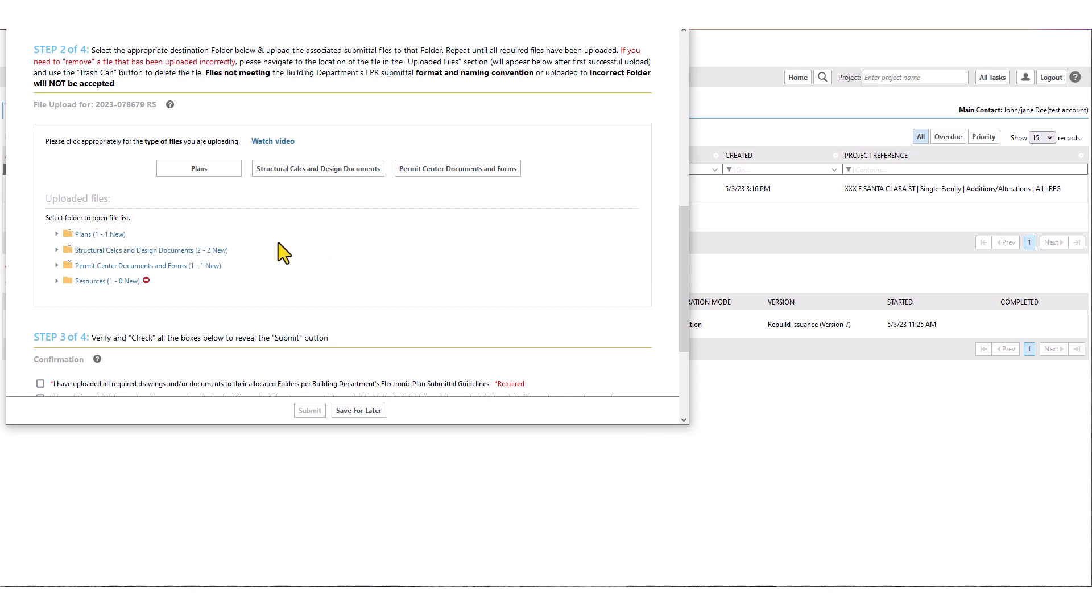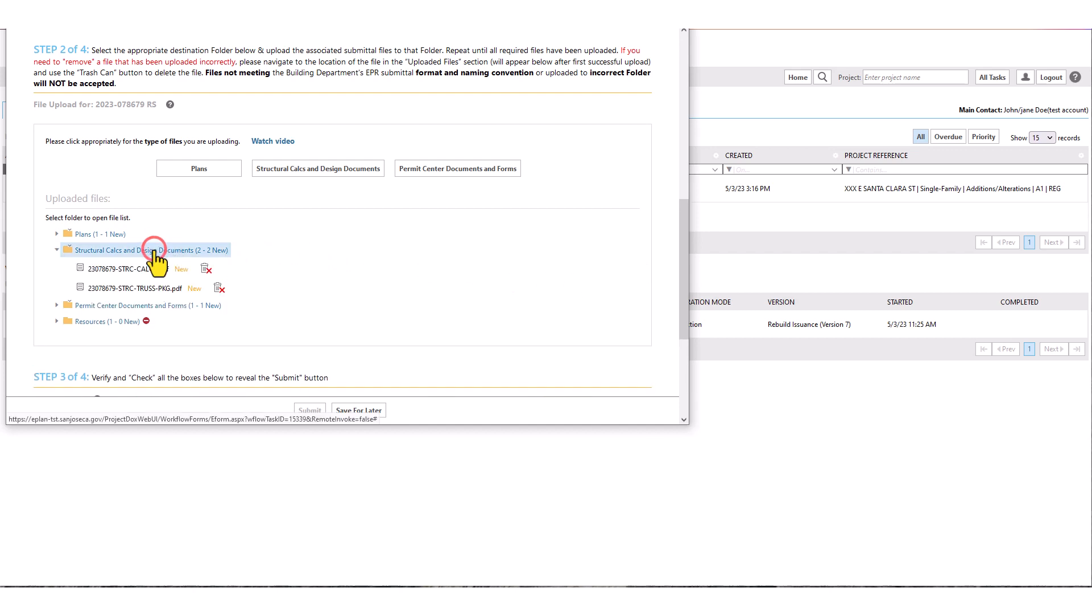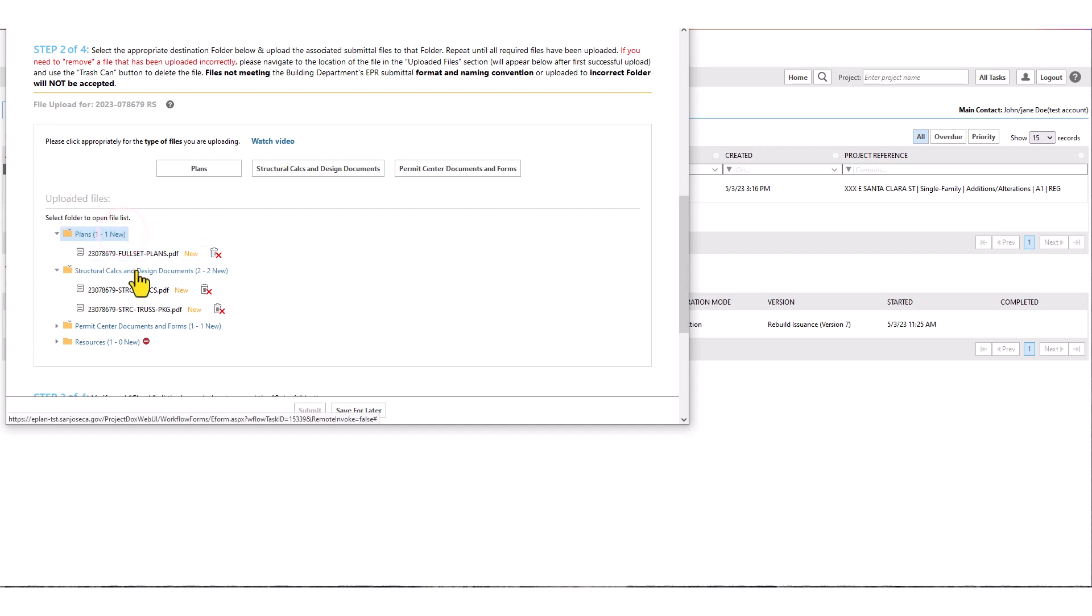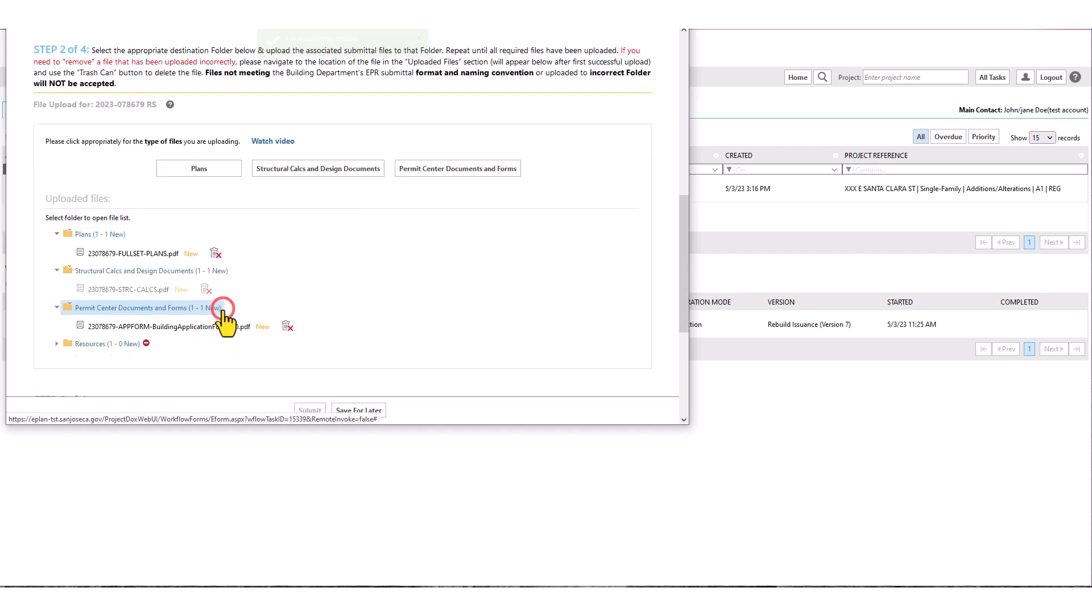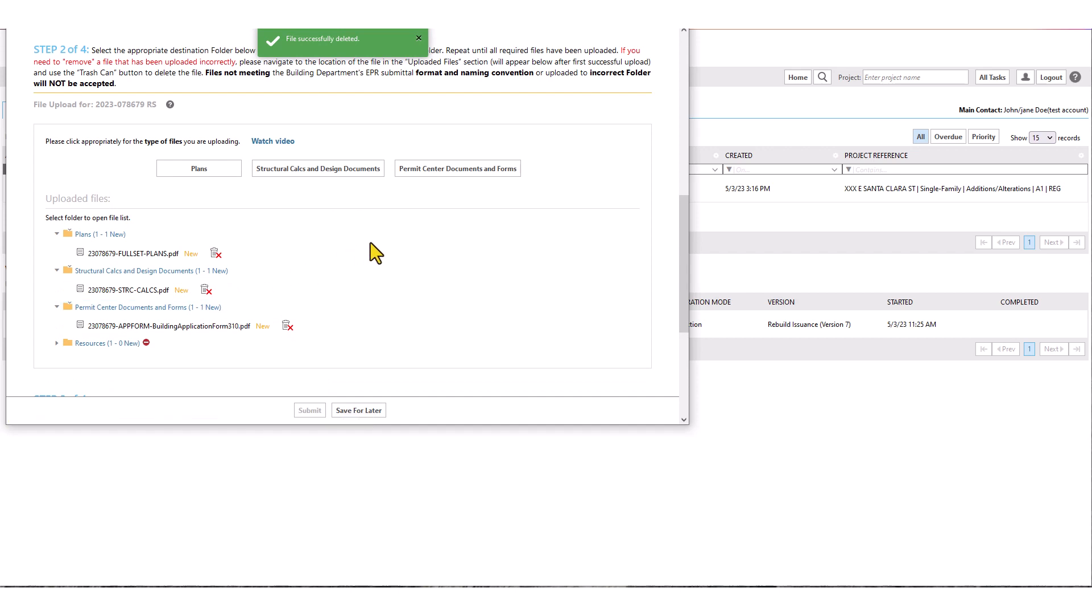You can check that all submittal documents have been successfully uploaded to each folder from within the task e-form by clicking on each folder name and reviewing its content. In case a file was uploaded mistakenly or if you needed to change it prior to submittal, you must locate the file and delete it using the trash can symbol in front of it. Then you can upload a new file as shown before. Please note you are only allowed to delete files during initial submittal process.